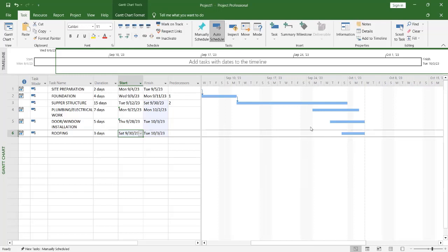The line here is 1, and then the line here is 2, and then the line here is 1, because at this point, Saturday becomes a working day. It's only Sunday that is not a working day here, right? But here, both Saturday and Sunday are working days, but you can do your settings to make even Sunday a working day, okay?